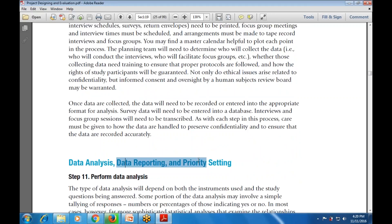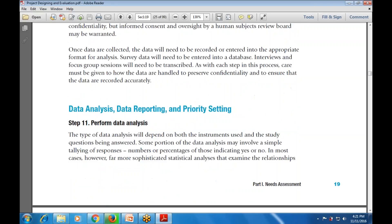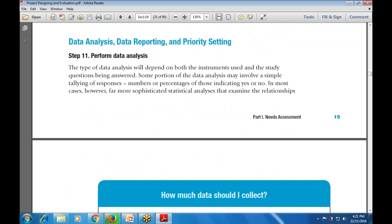Step number eleven is data analysis, data reporting, and priority setting. The first step is to perform the data analysis. The type of data analysis depends on both the instrument used and the study question being answered. Some portions may involve simple tallying of responses - numbers and percentages indicating yes or no - while most cases involve statistical analysis to examine relationships.